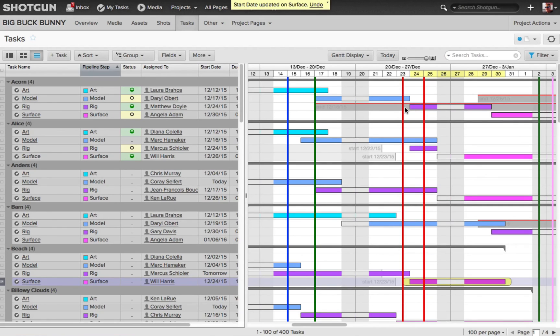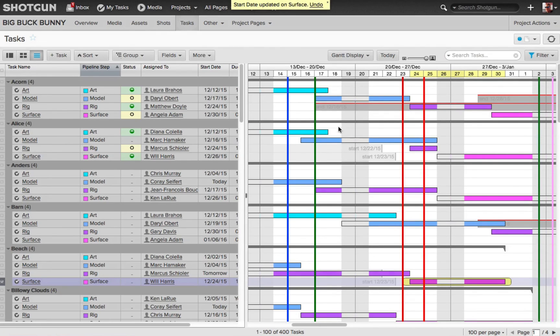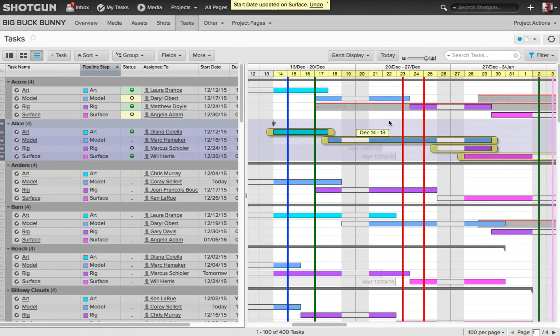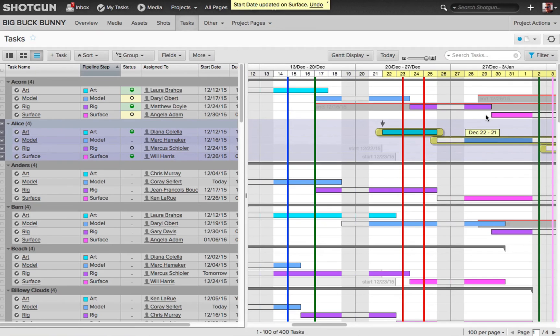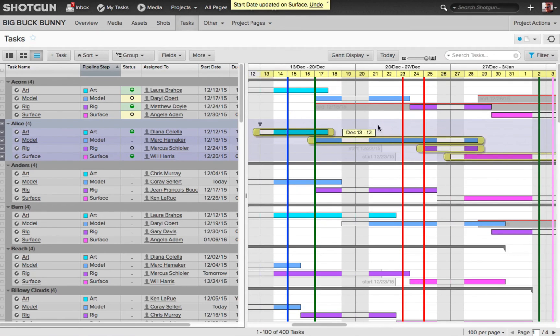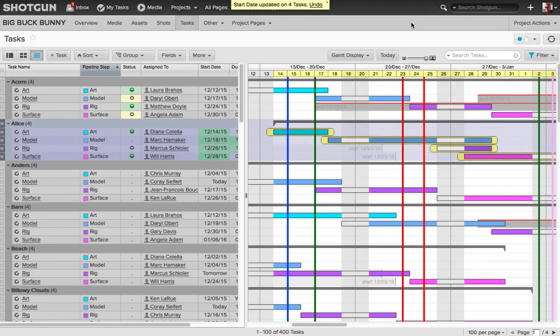So for example, let's say the sequence that the LS asset is in is getting delayed due to changes in the film by the client. Well, I can use the group bar to just quickly reschedule all associated tasks by simply clicking and dragging on them.